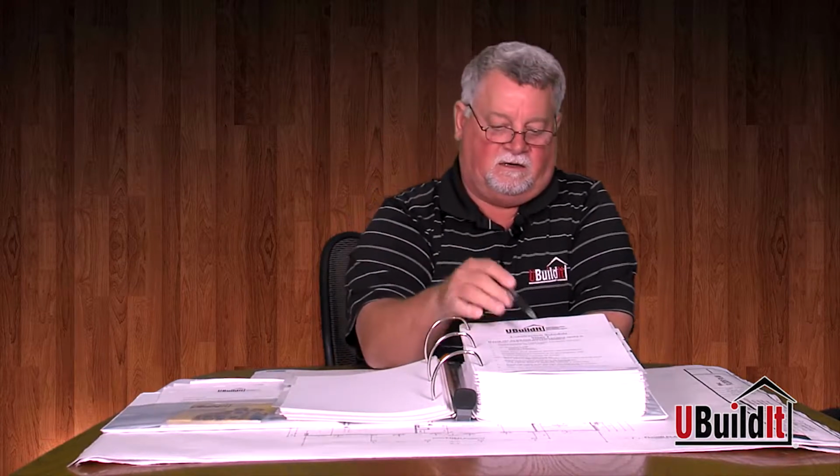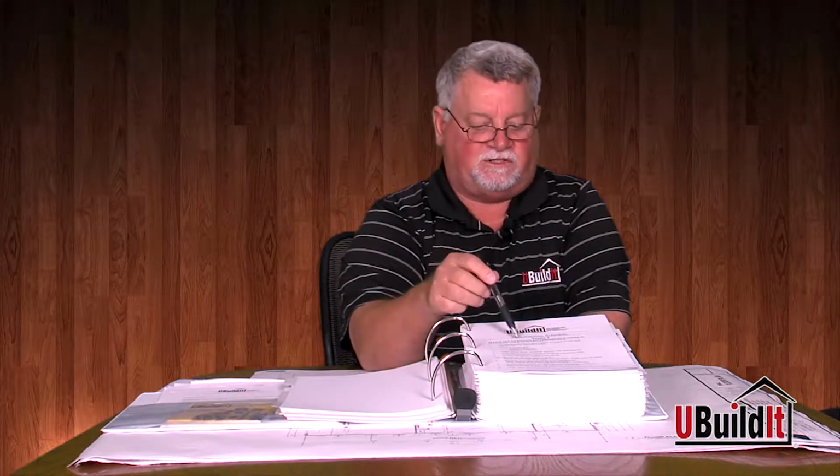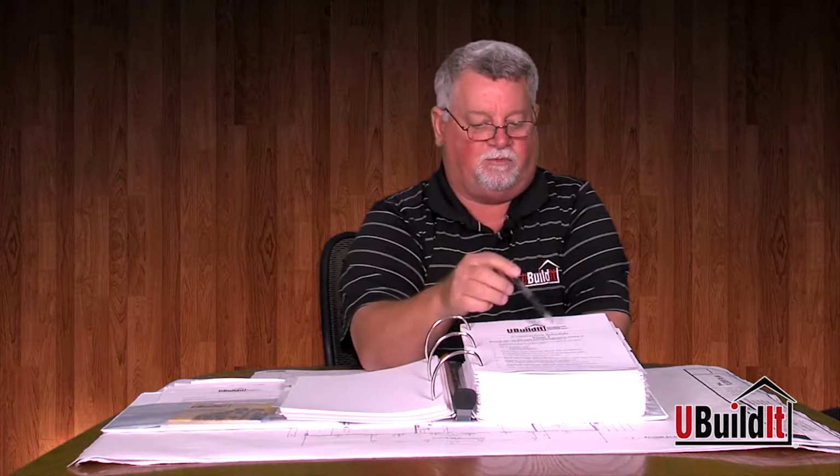The first thing it says to do is get a building permit. It also says, please try to follow these steps in progression to manage your project. We want to be sure you don't get confused by jumping around doing all the different steps. At the same time, we're going to help you when it comes time, say we're doing sheetrock on the inside and we're able to start bricking on the outside. So there's going to be a little bit of multitasking. We're going to help you.